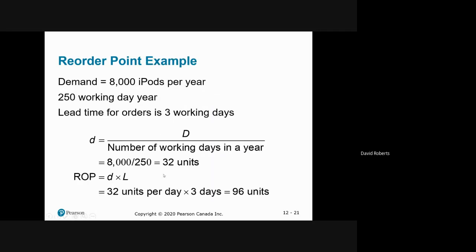So here's a graphic representation of reorder point. And an example, in this case, you have 32 units a day. It takes three days to replenish. When you have 96 units left, you replace an order.